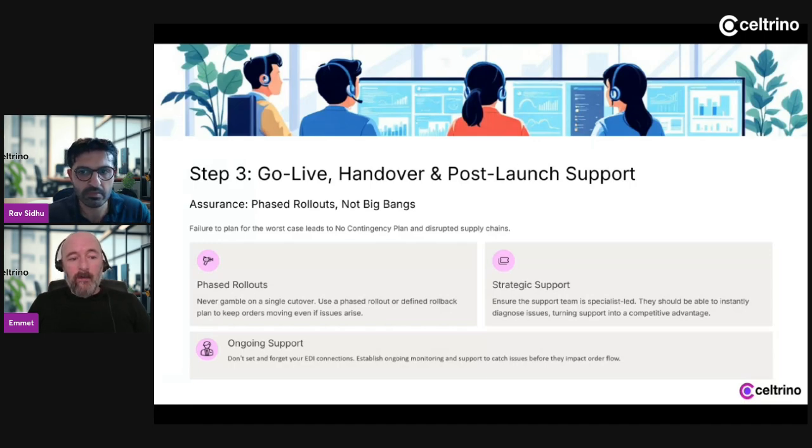So it's just a matter of going through the rejections that happen and cleaning it up. That's actually pretty straightforward. It only takes a couple of rejections before you clean up the data. So it's usually simple data issues, a missing purchase order number or invalid location codes, usually straightforward things like that.